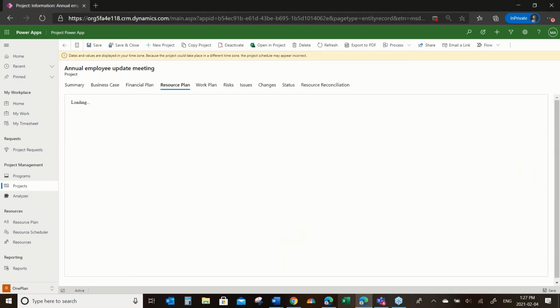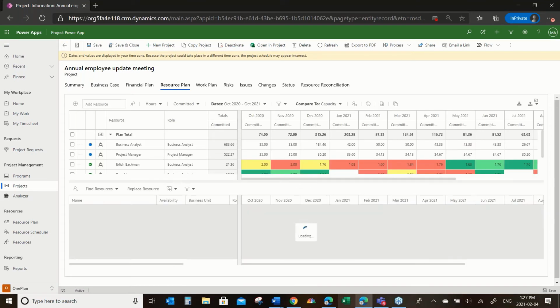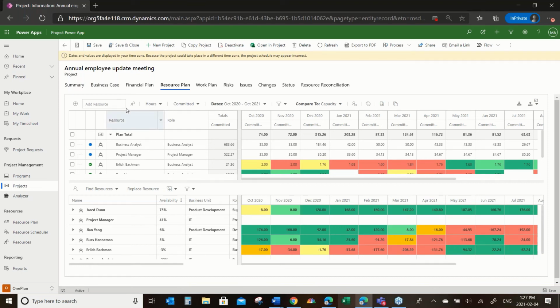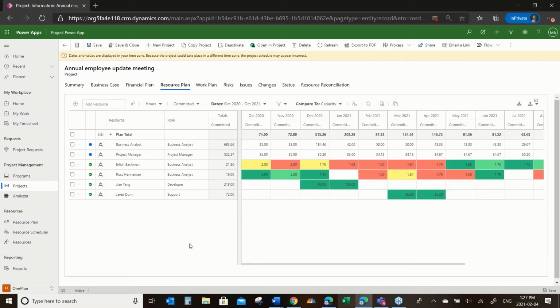Likewise, we've added some additional capabilities around resource planning. Now we can look at our resources in comparison to where they're being used in other projects. If we turn this off for a second and look at my project team, here you can see the resources that I have on the project, those marked with the little green check mark. They're active on my project, but wherever you see red, there's something there I might want to know in that there is an overage. Ehrlich is over allocated in that particular month, and I might want to, as a PM, look into that in greater detail.